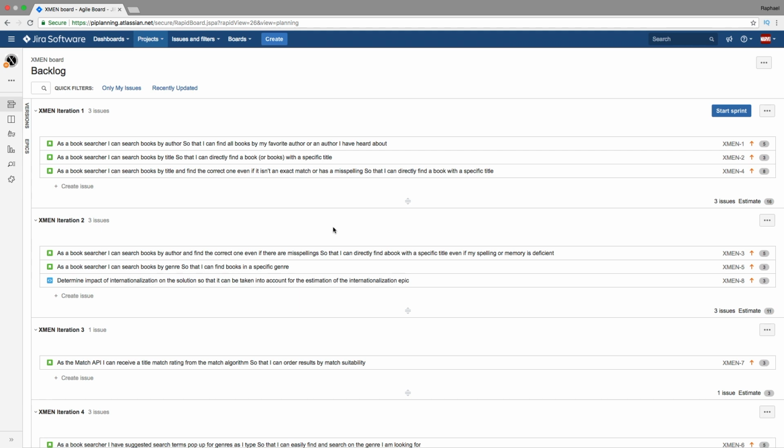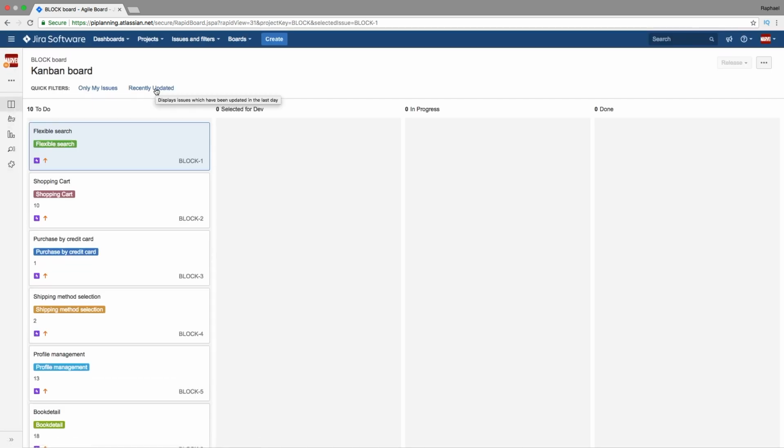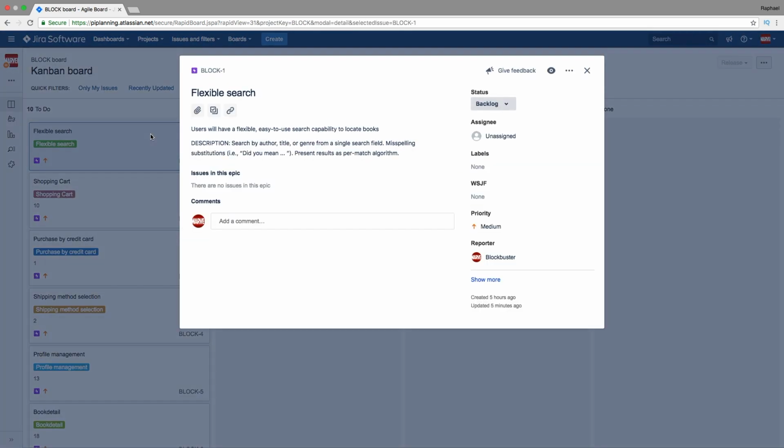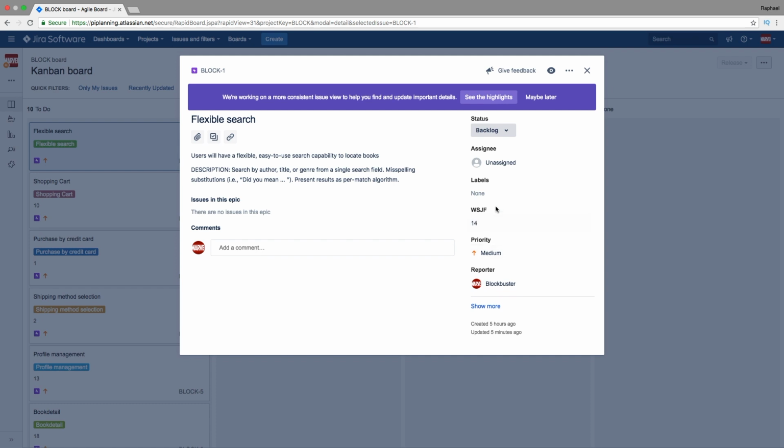In this video, I will show you how to manage the top 10 features in the PI Planning app. First, we go in Jira to the project that holds all the saved features. We enter a WSJF value for these features and we give the features a label called Feature PI1.